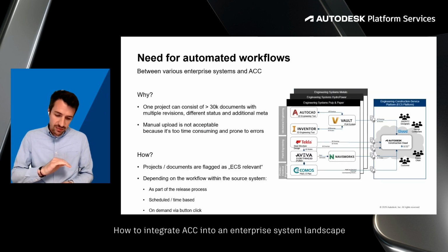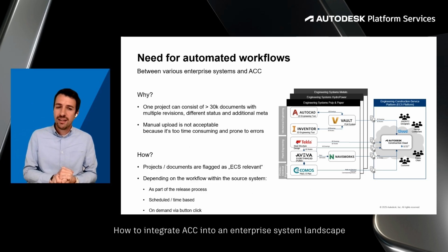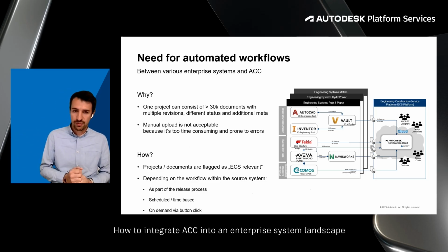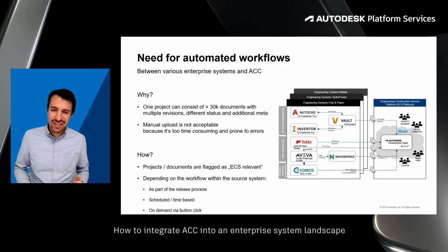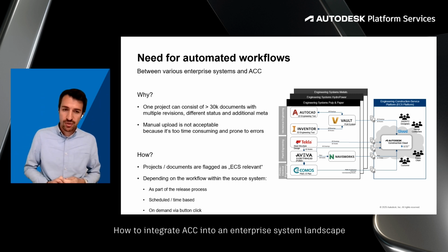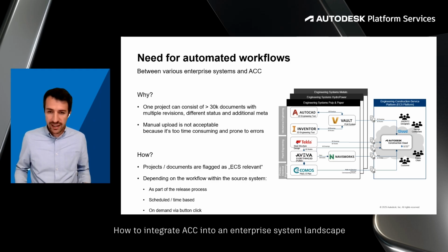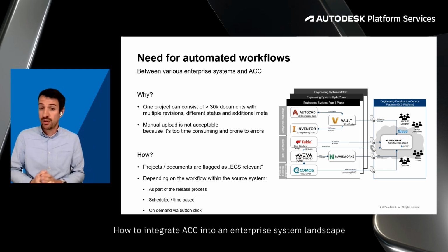And we started with ACC using the desktop connector, but we quickly learned that there is a need for automated workflows. Already our first bigger projects consisted of more than 30,000 documents with multiple versions, revisions, different status, and also additional metadata that were needed to have access in ACC. And maintaining that manually, uploading that manually was not acceptable because it's really time consuming and also prone to errors, to forget to share the latest information, for example, or the latest version.